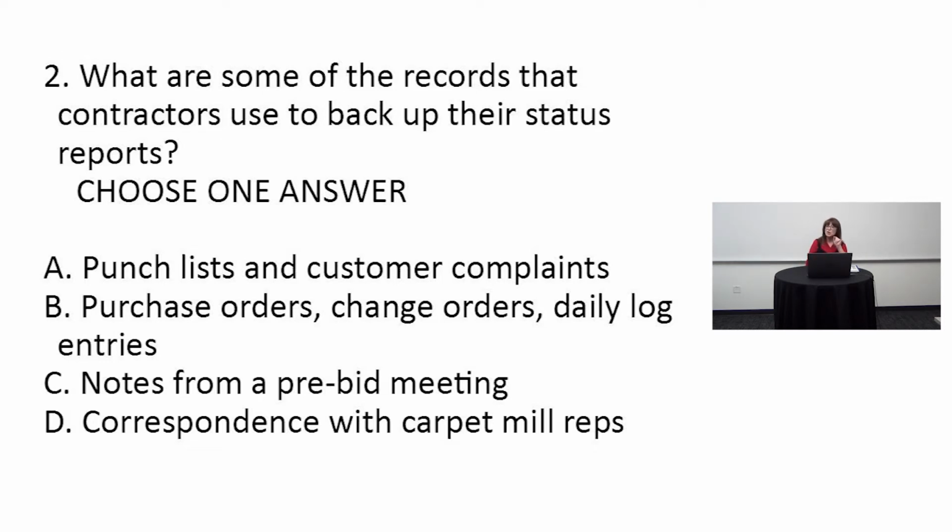Okay, number 2, what are some of the records that contractors use to back up their status reports? We're looking here for B, purchase orders, change orders, and daily log entries.